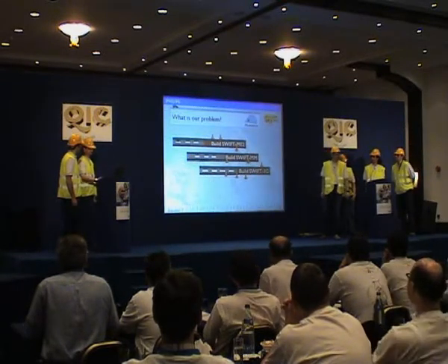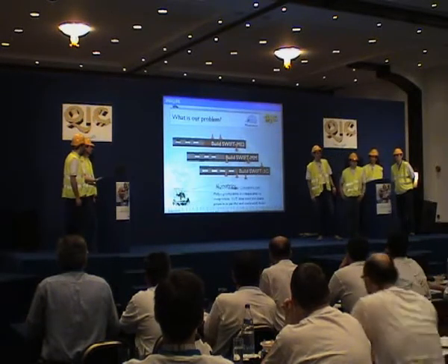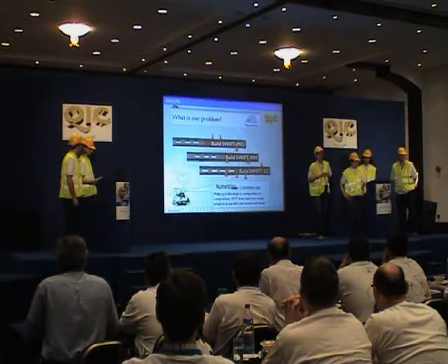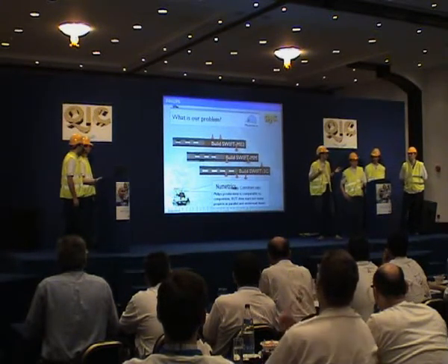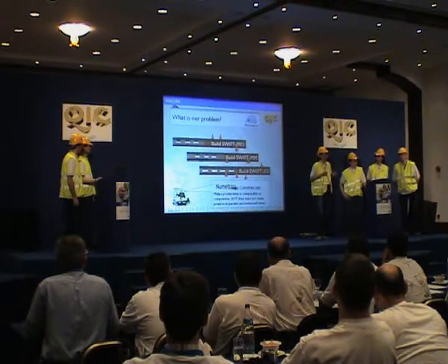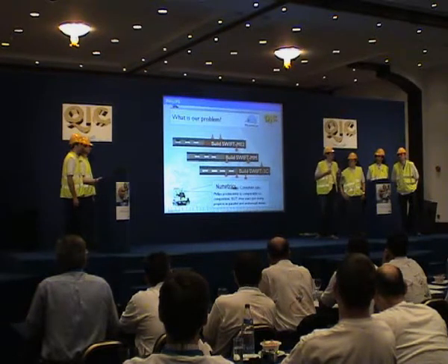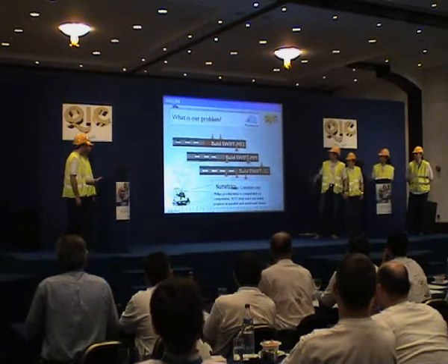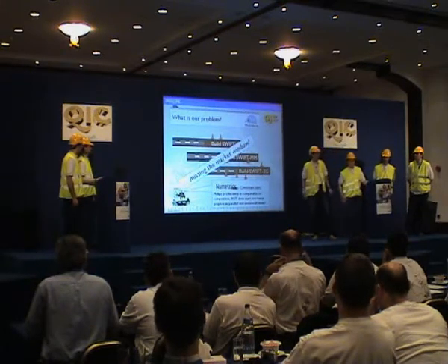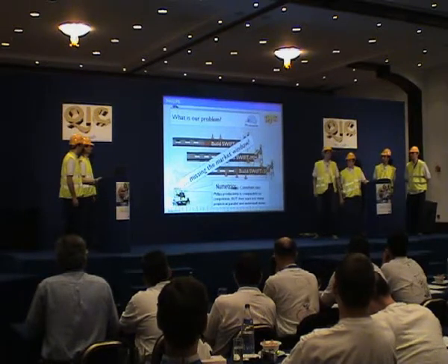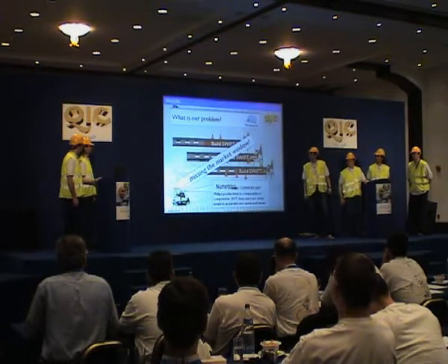What is our problem? Our problem has been described once by a numerics consultant saying the following: Philips Semiconductors has a development productivity which is comparable to the one of the competition. But in contrast, we start too many projects in parallel, we understaff them, have delay, and miss the market window, which of course is a loss of a lot of money because we have to stop certain projects.